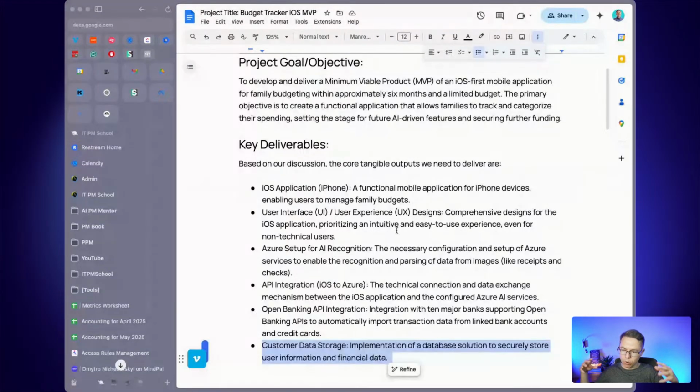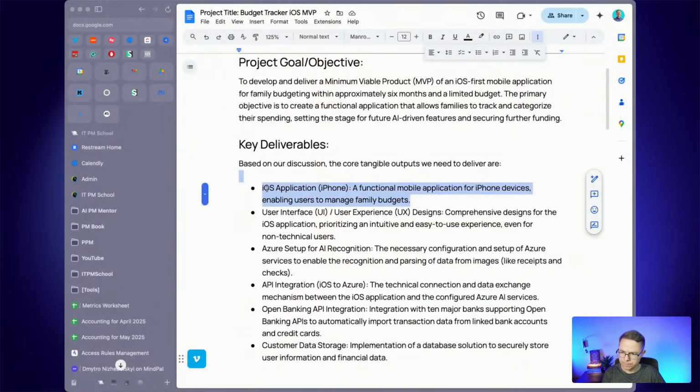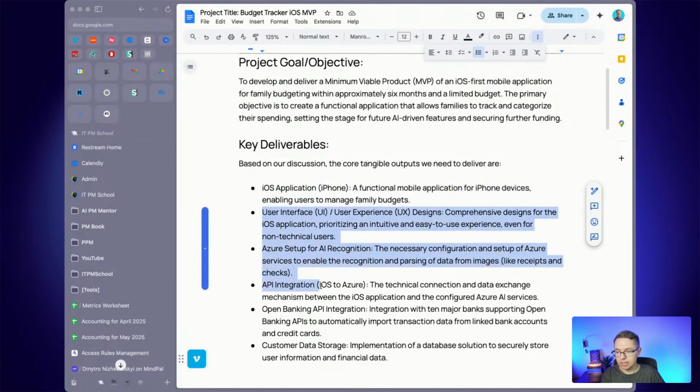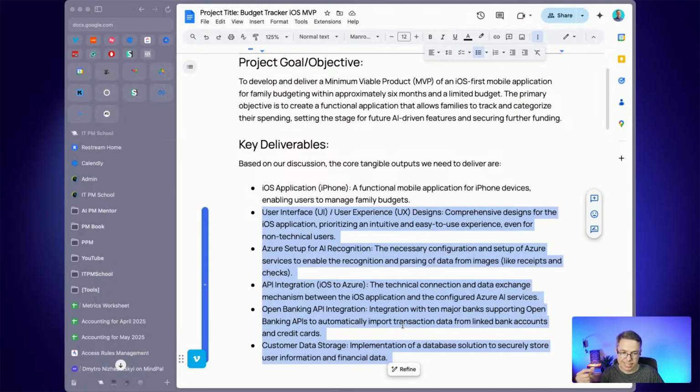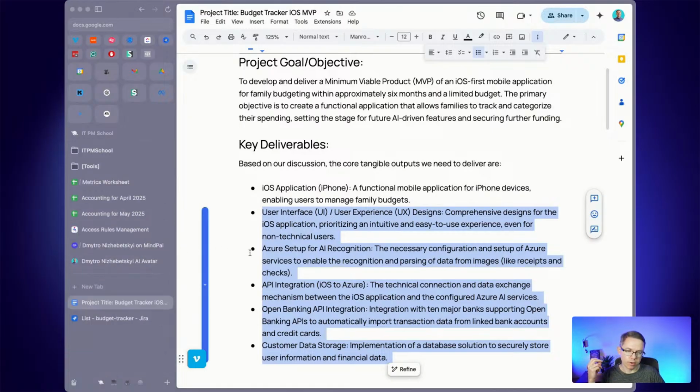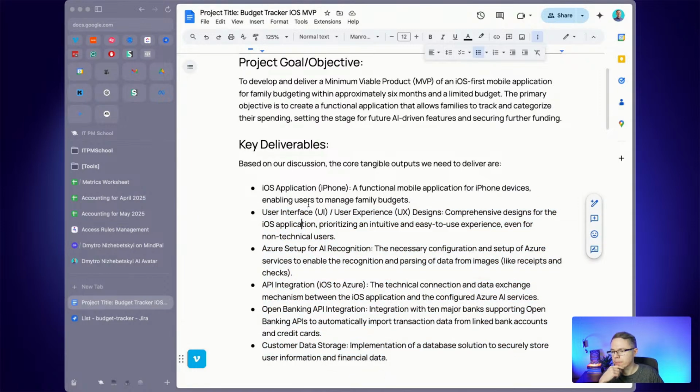We start thinking about all the deliverables that we need to hand off to the customer. It's not only just this part. Because what really happens on most projects is that teams are so focused on the main deliverable that they forget about or miss deliverables that are maybe small and less important, but still they are part of project success. So what do you do here? Basically, if you work in Jira, we'll be using Jira as an example, but it applies to any project management tool. You want to organize the work by deliverables.